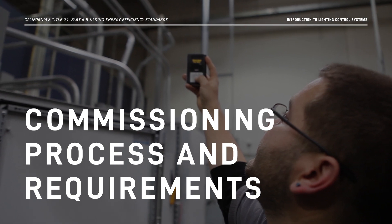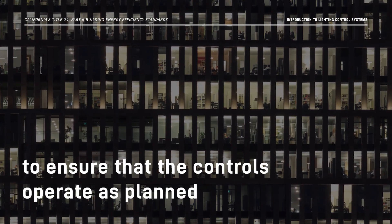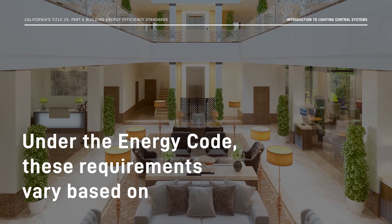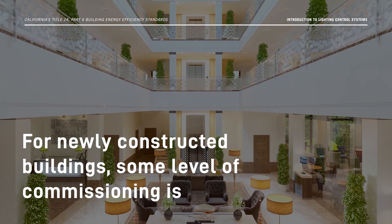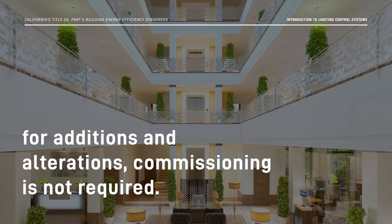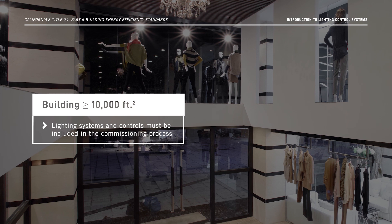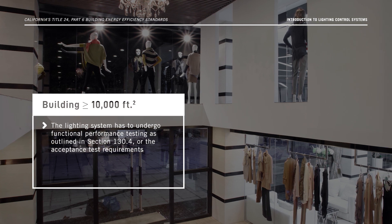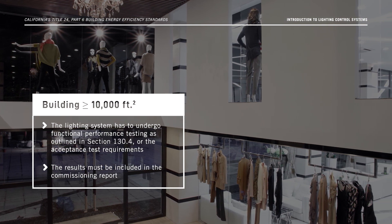Moving on to commissioning requirements. Commissioning is required for all newly constructed non-residential buildings to ensure that the controls operate as planned and expected by the building owner. Under the Energy Code, these requirements vary based on the size of your building and the type of project. For newly constructed buildings, some level of commissioning is always required for compliance, but for additions and alterations, commissioning is not required. If your newly constructed building is 10,000 square feet or larger, lighting systems and controls must be included in the commissioning process. The lighting system has to undergo functional performance testing as outlined in section 130.4 or the acceptance test requirements, and the results must be included in the commissioning report.